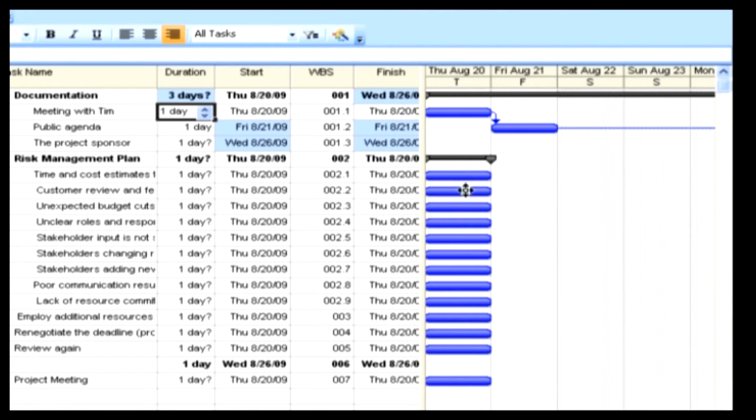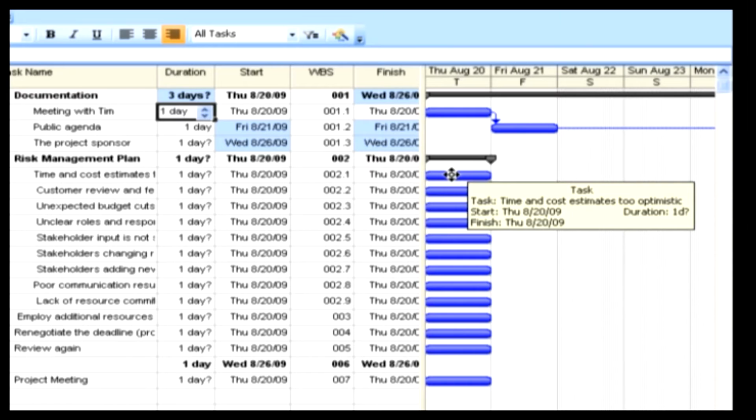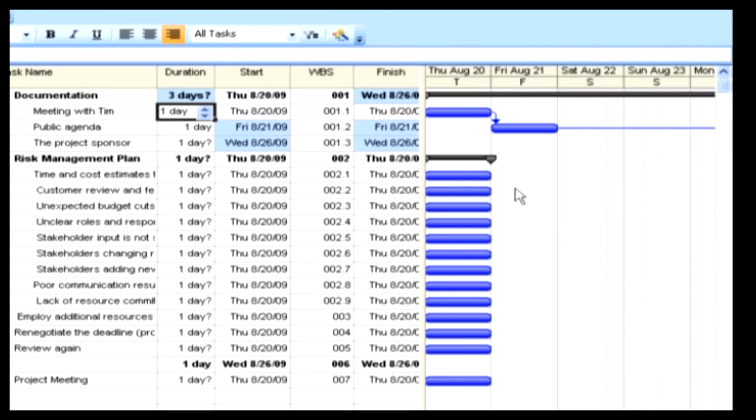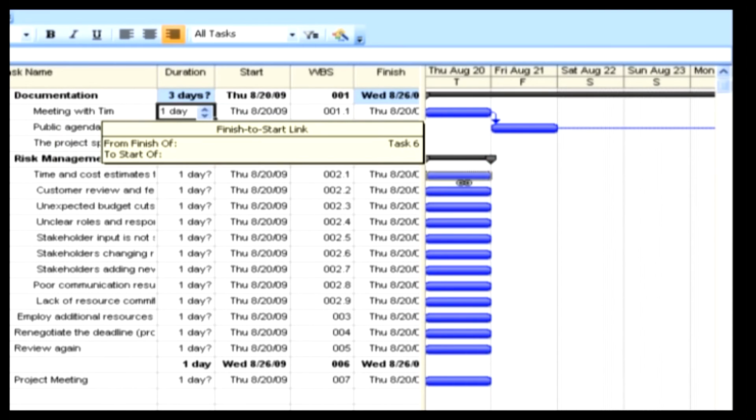We can also do the same using the Gantt chart. Let's discuss how to create a link in the Gantt chart. See, here we have some tasks. Select a task. Let it be this one. We can see that our mouse pointer has now changed to a 4-sided arrow. What we have to do is drag the task we've selected and move it to another task.